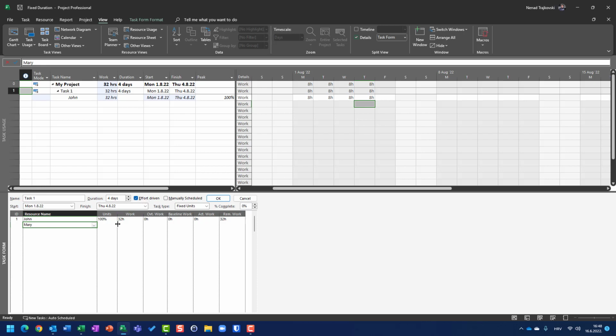Those 32 hours are going to be split between John and Mary. And what will happen? John is going to work 16 hours, Mary is going to work 16 hours, and the total of 32 hours is going to be done in 2 days.